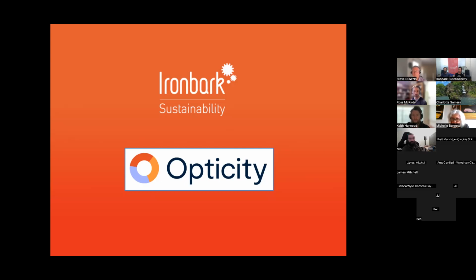Forever, when you're doing decoratives, we've always recommended doing a decorative audit, a field audit, to identify exactly what lights are there, the colours, the attachments, and things like that. But often that would come after the business case. So I think given the depth of the issues that we've had, under certain circumstances, we're now suggesting do that audit before you do the business case, because doing the audit down the track, there's been such a huge change to the costs of a project that it really needed to be identified earlier on.